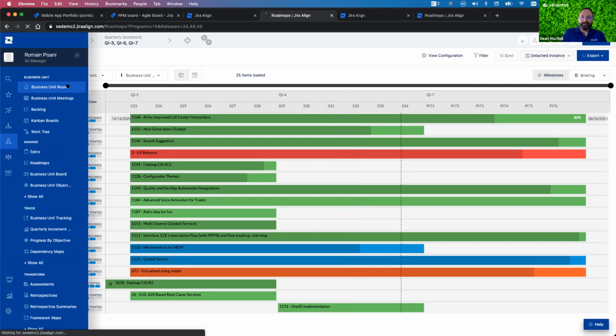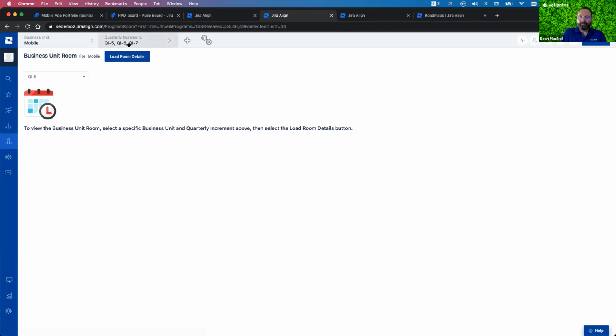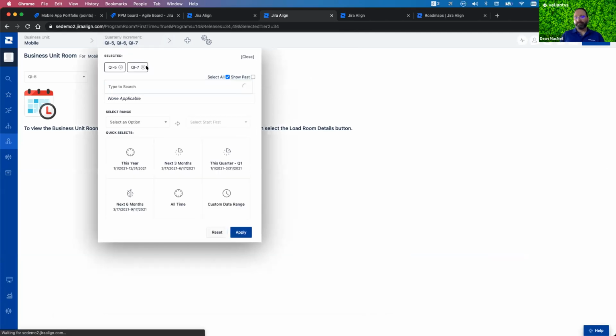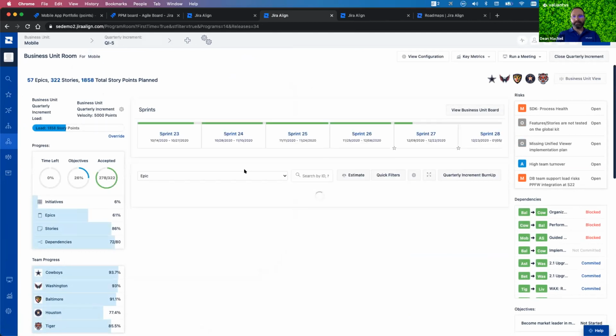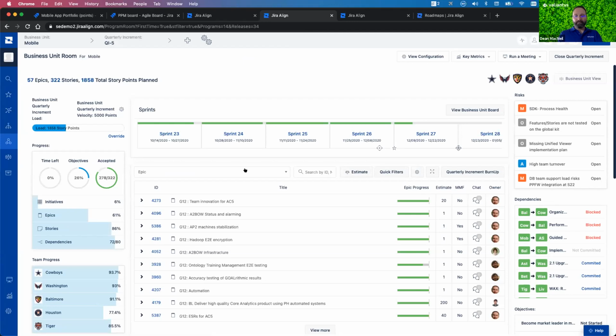Now, what is really interesting as well is that Jira Align has a real comprehension, as I mentioned, for the program level as well as the portfolio layer. Here you can see we can select different quarterly increments. So that's that program layer where we see what we're going to deliver for a specific program for the next period of time. And so you have a lot of different levels of reporting, like this one that we see here, that is pretty much a configurable dashboard for the program layer, with things that you would not be able to see very easily in Jira without adding multiple plugins, such as the overview of all those different sprints that are part of that specific program increment, and the current load of that program. That's directly based on the number of story points and the overall velocity of the program. So you can have this visibility here, which is not something that is super easy to get out of Jira software.